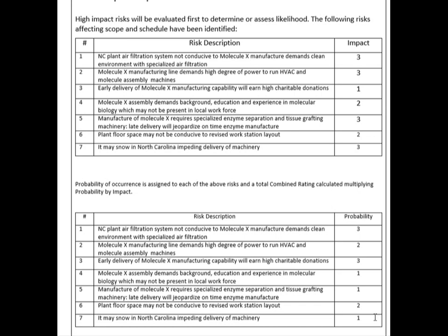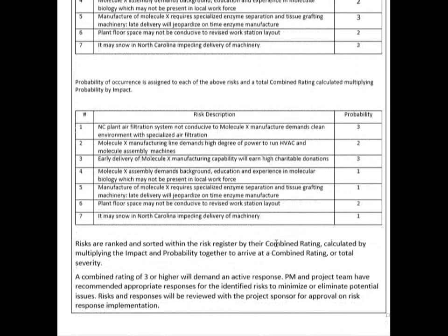So our probability is very low on that one. The air filtration system is very high because having a clean room environment is critical to the manufacture of the enzyme. I've also ranked and sorted in the risk register by a combined rating.